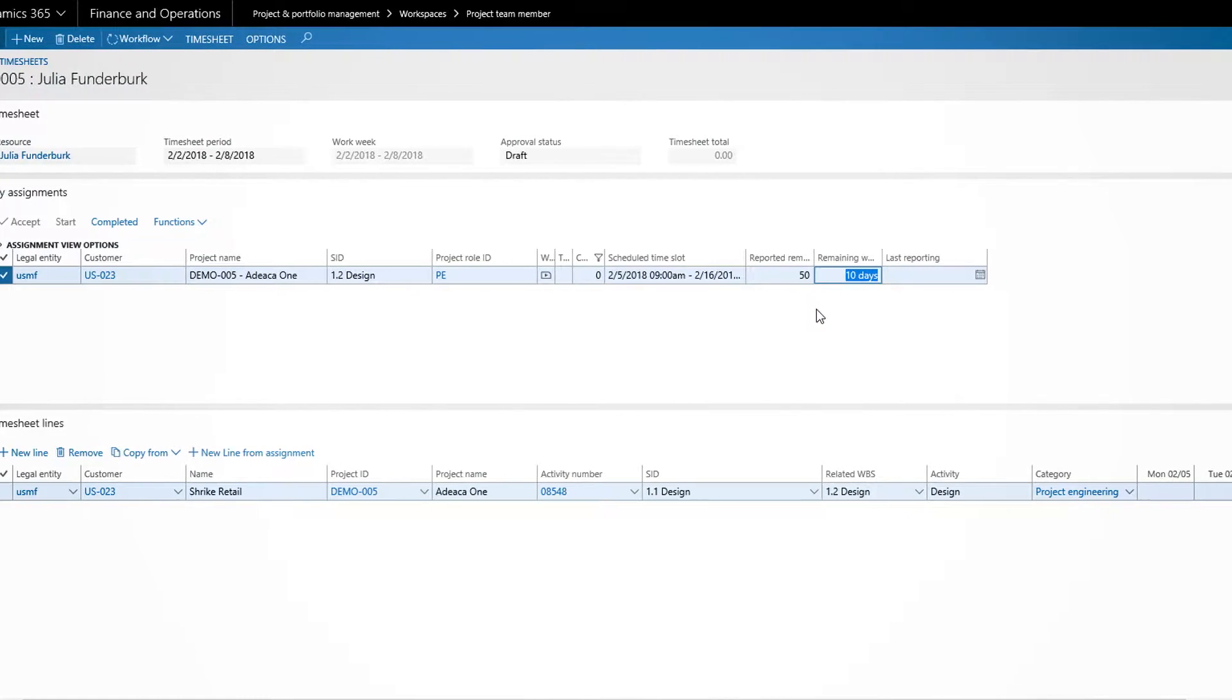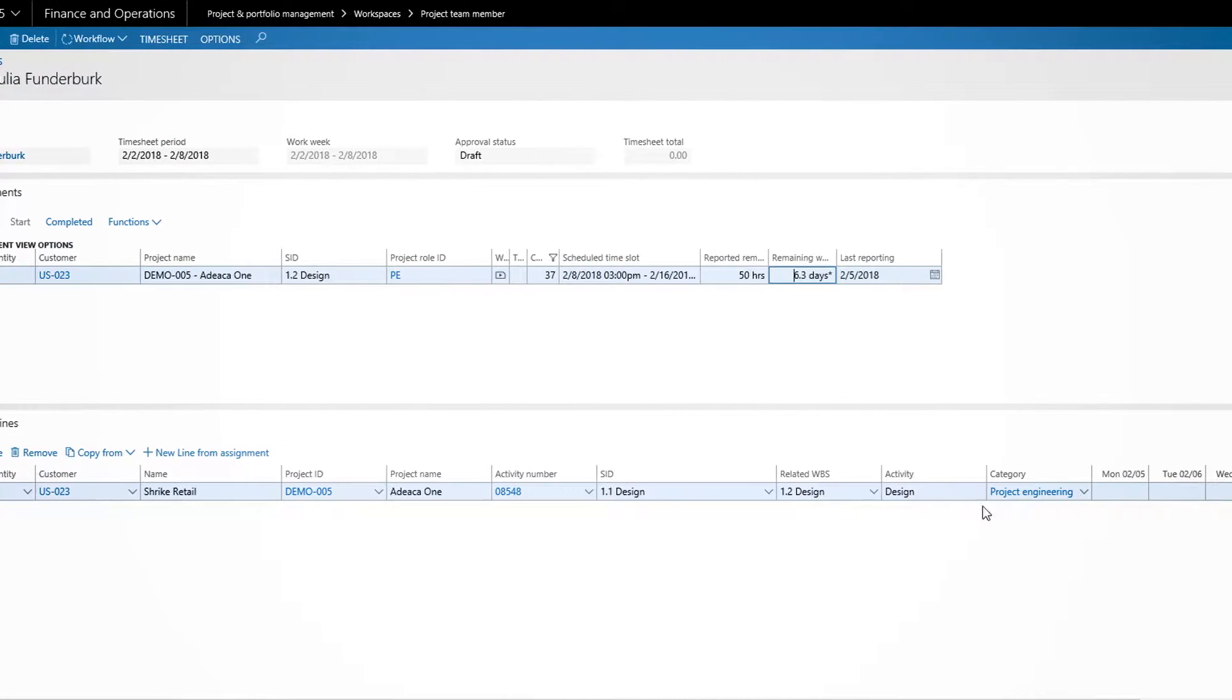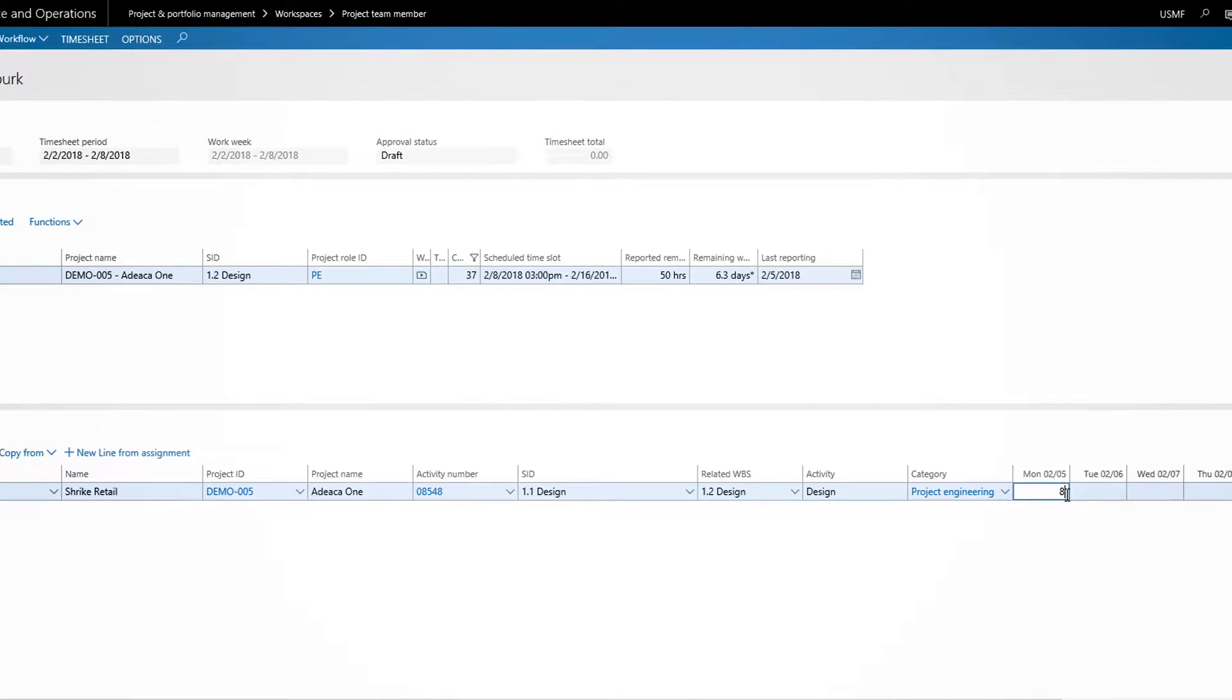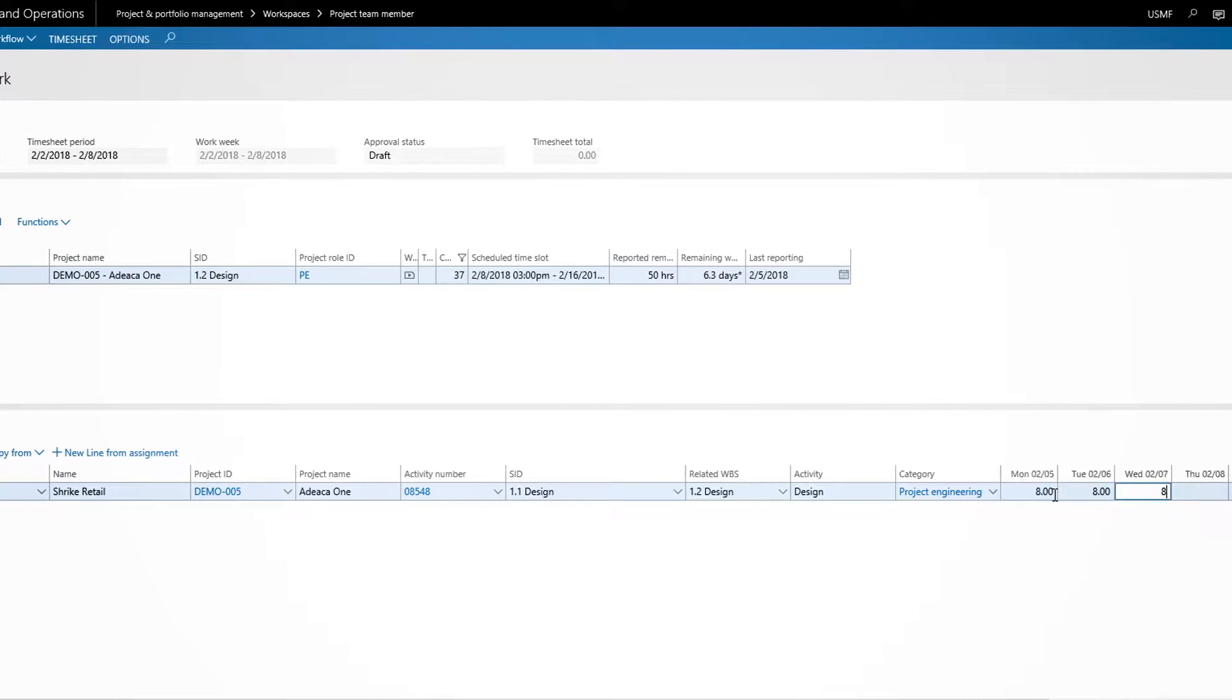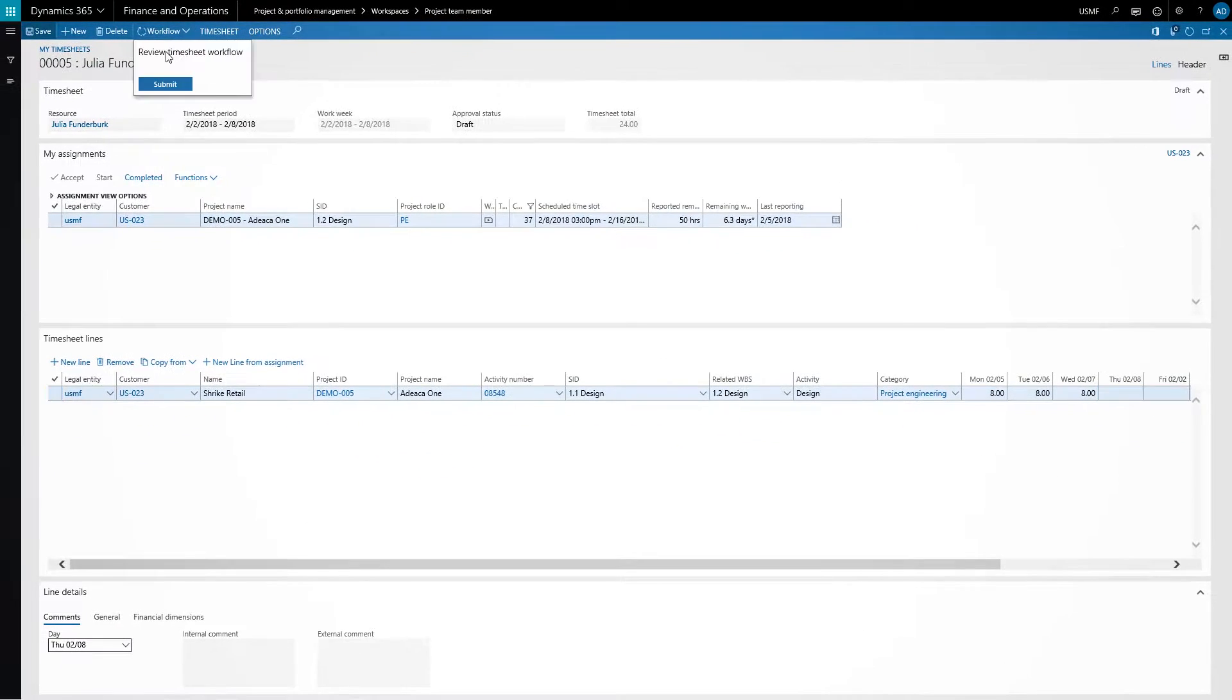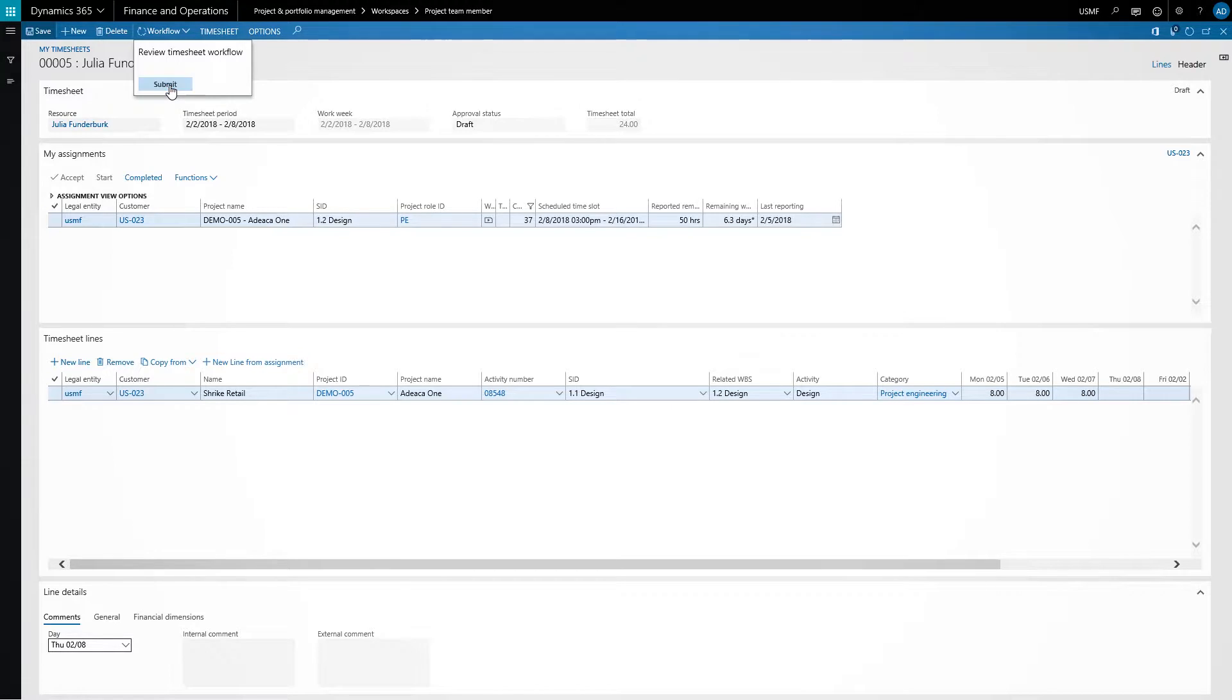Status updates, issues, and remaining work estimates can be fed back to the schedule directly from the timesheet, facilitating real-time collaboration between the planner and project team members.